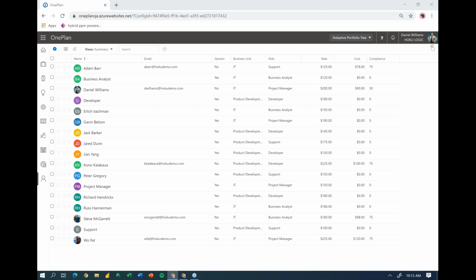The other thing that we did is if you're utilizing the new rate tables that came out in the last release, we've updated some of the calculations around those rate tables to use the new rate table functionality. There are two in there, assignment revenue and assignment costs. Those are now available to be used in all different types of calculations. So for example, if you wanted to create assignment revenue minus assignment cost to get profit, you can do that in any calculated field instead of having to refer to the other calculated fields that already do those calculations. And then the other thing is actual revenue.